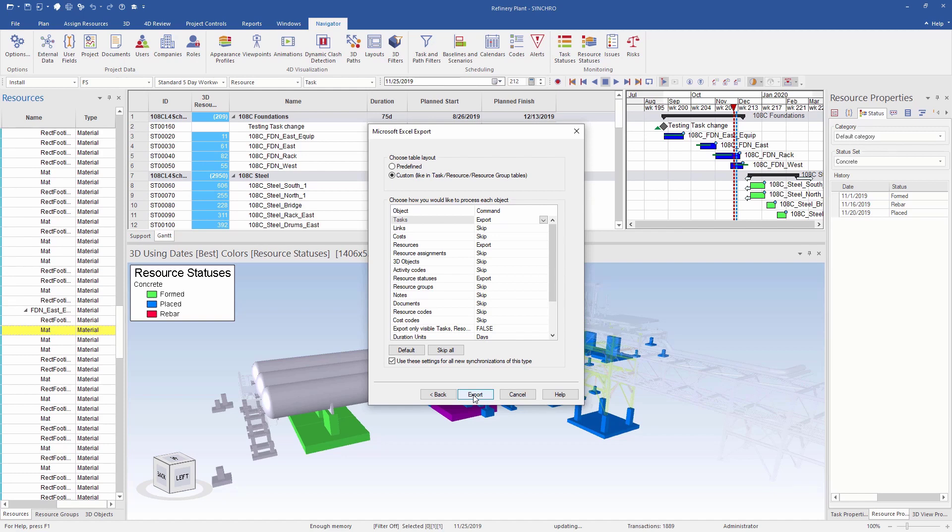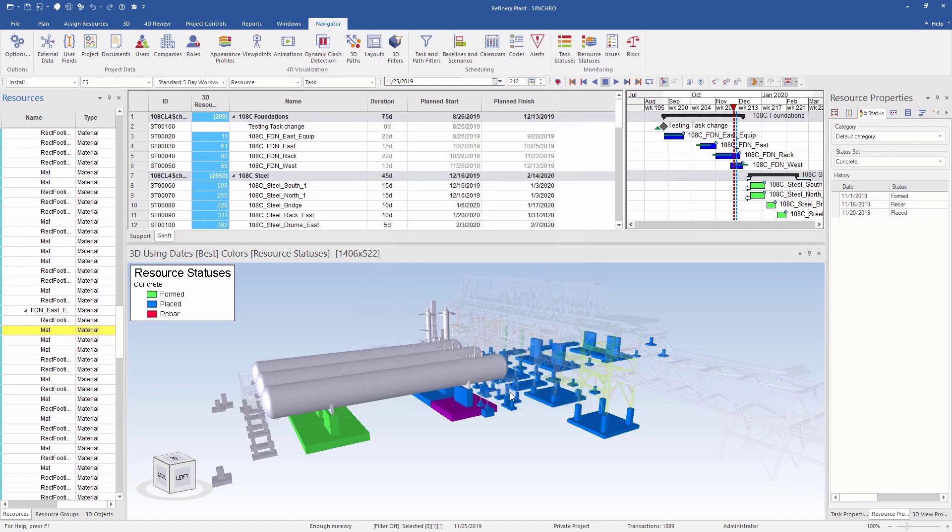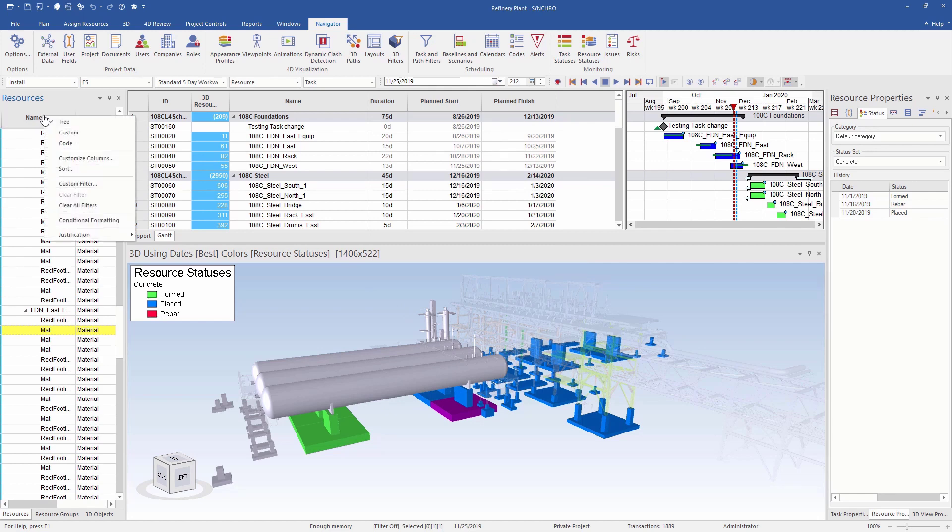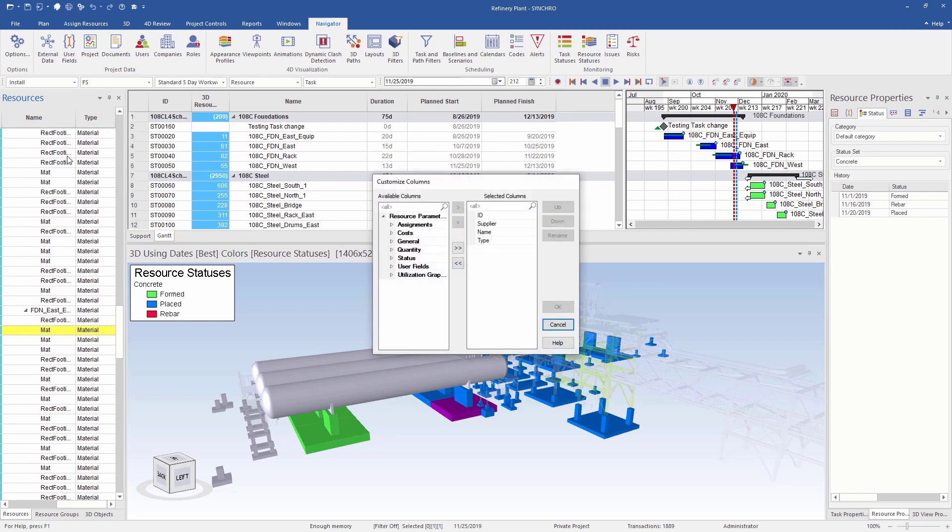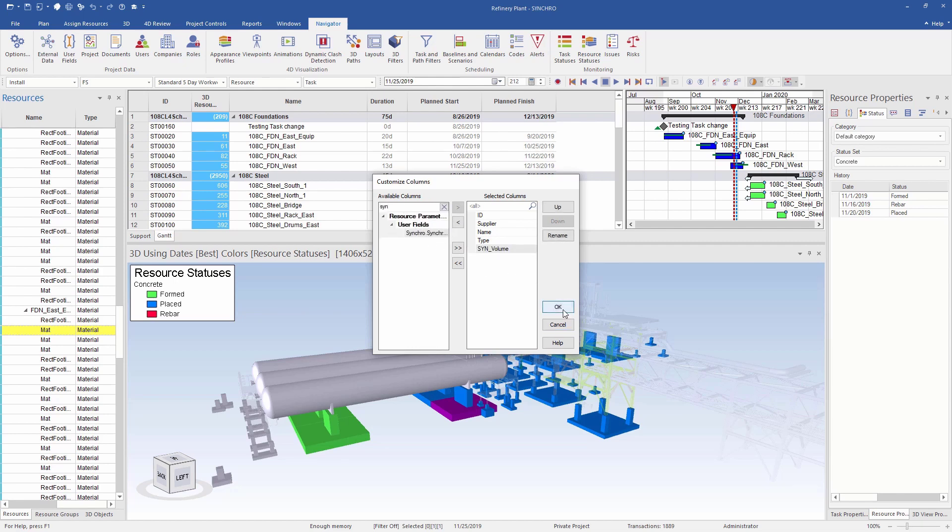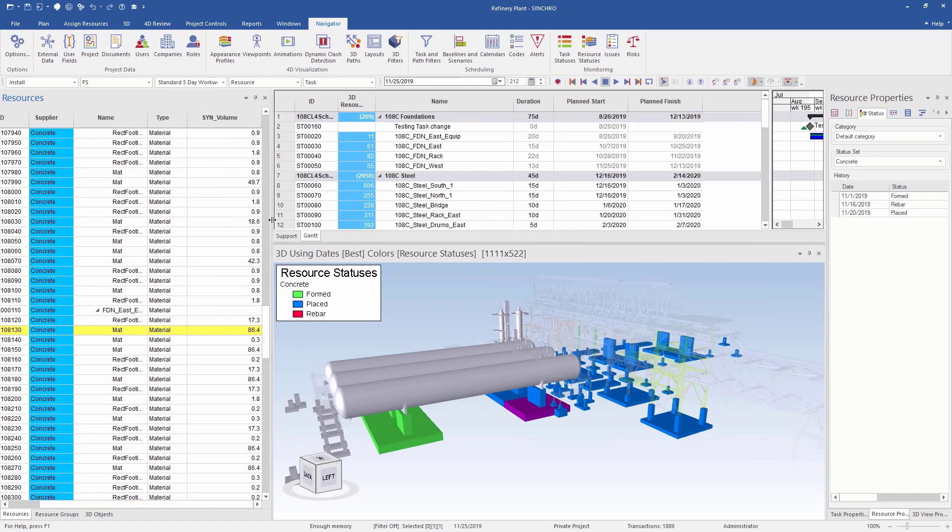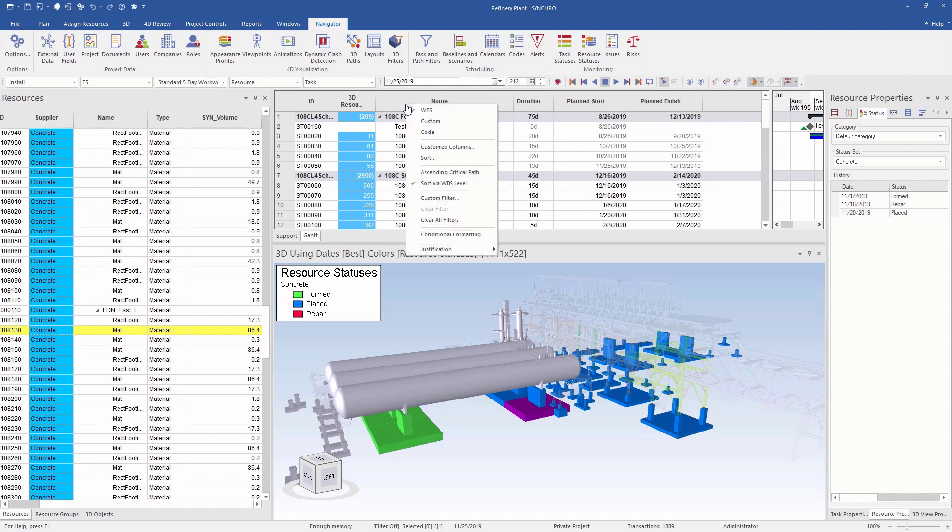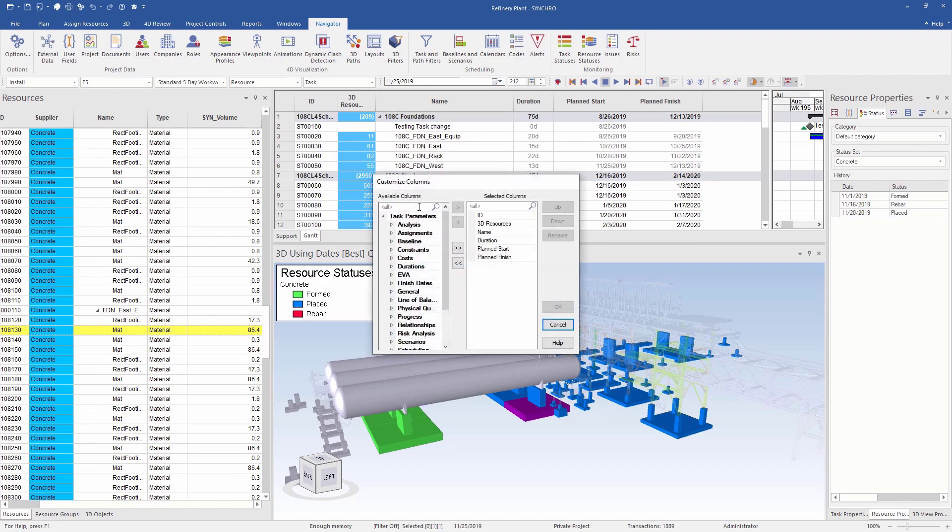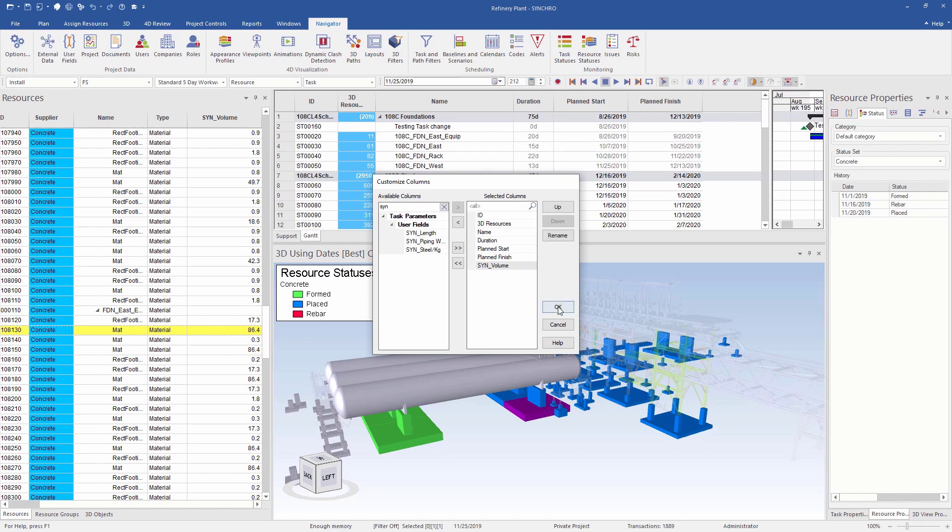In addition to resource status dates, I also want the volume of the concrete assigned to the resources as well as the tasks so that I can quantify it in my Power BI visual. For that, I'll go to the resource window, right-click on the header, customize column, and select the volume user field. I will do the same for the task as well, where the volume field actually sums up the volume of all the resources assigned to that particular task.